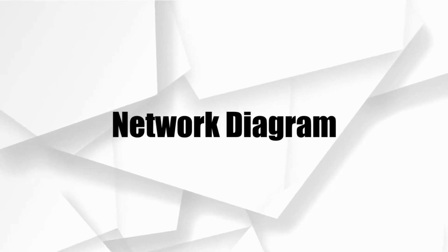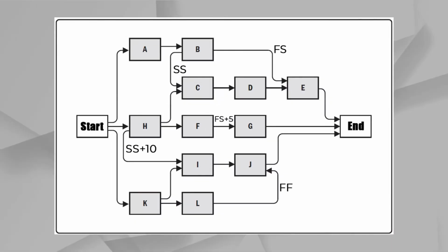Network diagram. A network diagram, also called a schedule network diagram, is a graphical representation of a logical relationship, also known as dependencies, between project schedule activities. You can include details of the entire project or have one or more summarized activities. A summary description is a good practice in accompanying the diagram and describing the approach used in the sequence of activities. As best practice, any unusual sequence of activities within the network should be fully described.